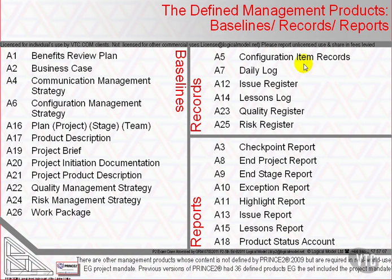The configuration item records record the status as projects travel through their life cycle of work, from not started, work in progress, ready for test and then maybe ready for rework, otherwise ready for integration, and finally ready for delivery and delivered. A product status account, on the other hand, is a snapshot in time of the current status of a collection of configuration item records — for example, all the products allocated to a particular team or stage.